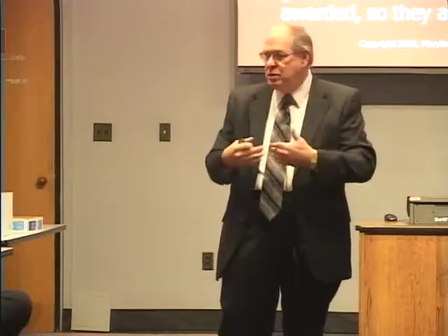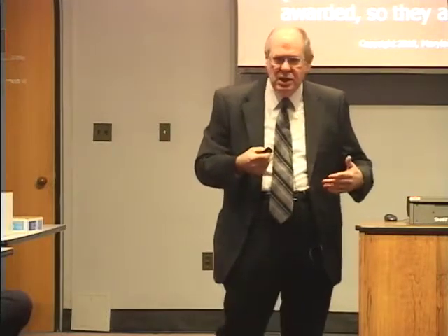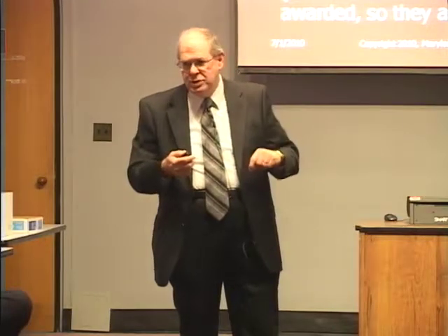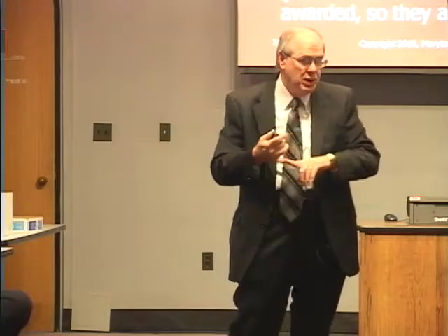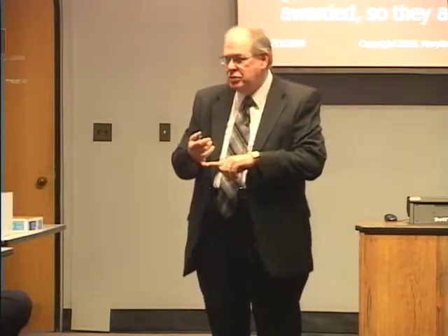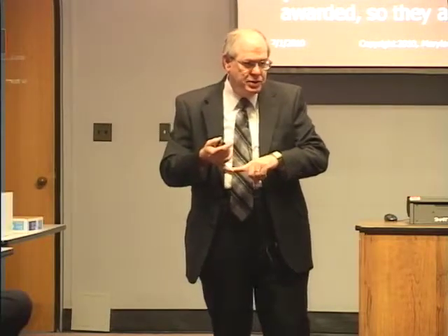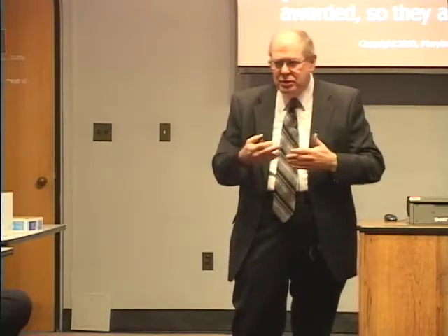So if you're getting to the point that you notify a vendor of problems and show cause and remediation plans, things of that nature, you need to let the surety know. And sometimes, depending upon the exact nature, you might have to go to your Assistant Attorney General to ask their opinion, because there's a difference between what's called a show cause letter, which is a preparatory step to a termination for default, versus a request for a remediation plan. Sometimes even a request for remediation should go to the surety, but that's something you probably need to discuss with your attorney.